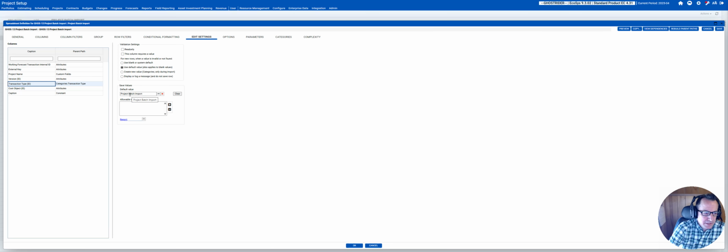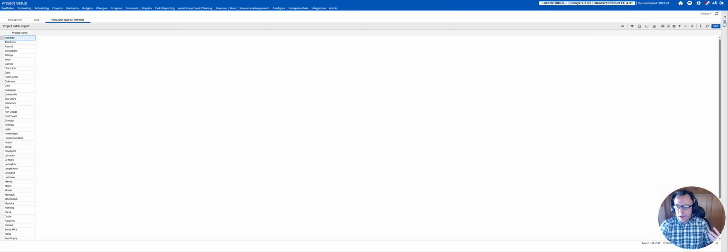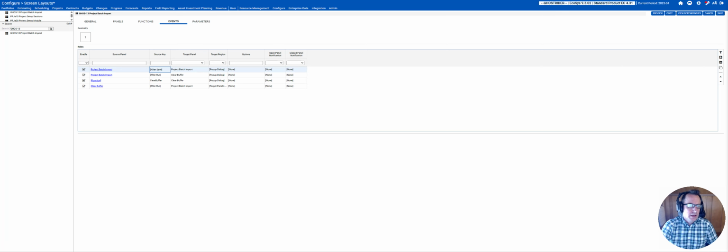But I am stamping these with a special transaction type, putting them in this dedicated cost object that I created for this feature, and this is that fake caption column, and that's it. So when we import, these are just WFTs that are getting added to that cost object and that version and that transaction type. And then you hit save, and that triggers this action batch.